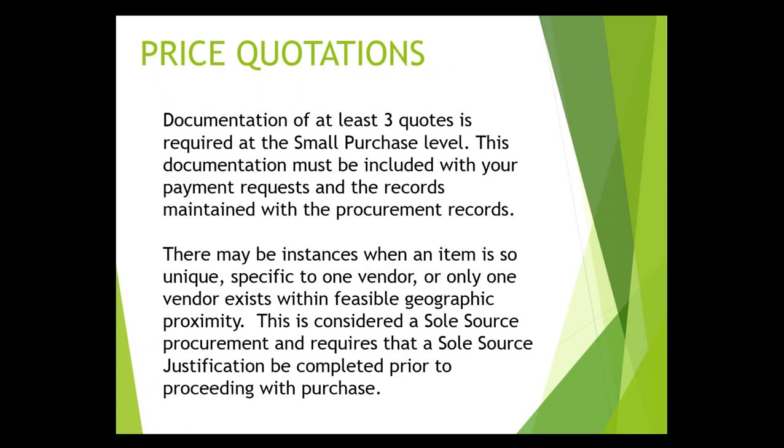Price and cost quotations are another part of the process. Documentation of at least three quotes is required at the small purchase level. This documentation must be included with your payment request and records that you maintain with your procurement records.